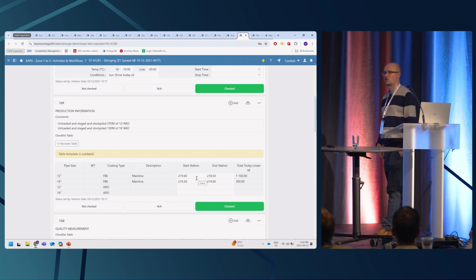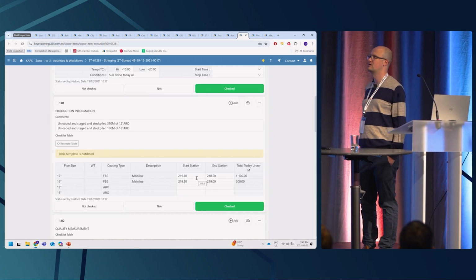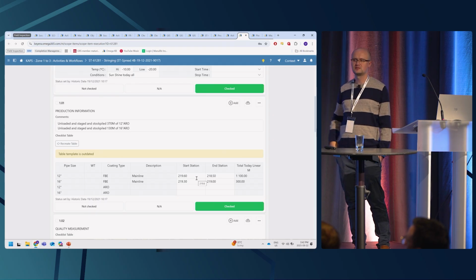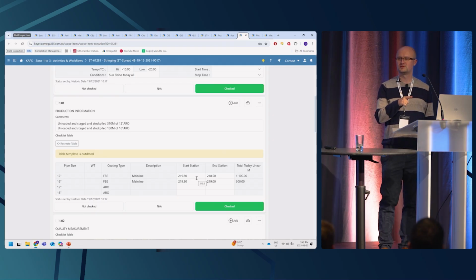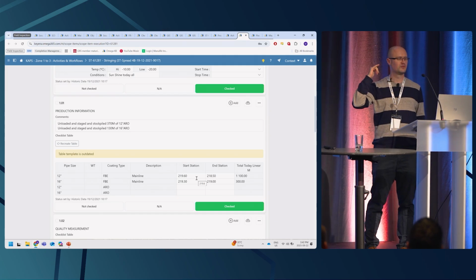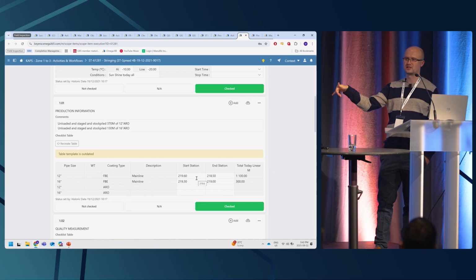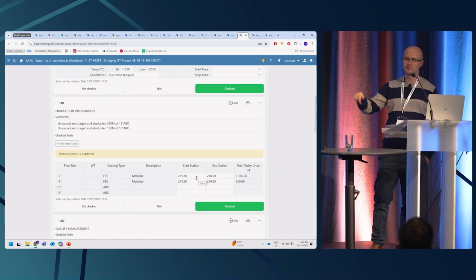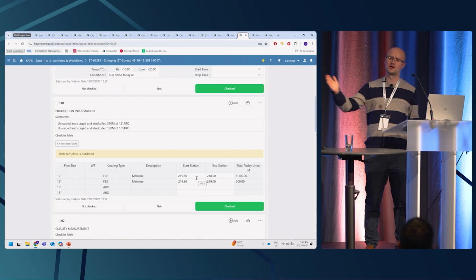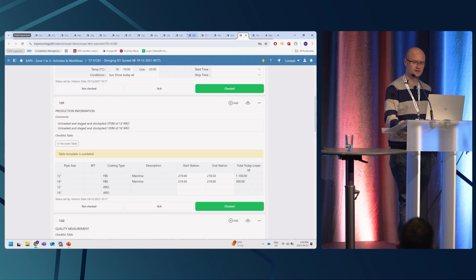So I can see how far along we're working, and these reports are all done by field guys, construction guys. They're out in the field doing all these, and then they'll take an image, and then we take that image, we extract the GPS out of it, and then we find out, okay, what's the closest kilometer post to that? And we automatically assign that to the kilometer post, and then we check how much progress they made. And that way we can take that map and progress it so you can know how far along you are in the pipe.